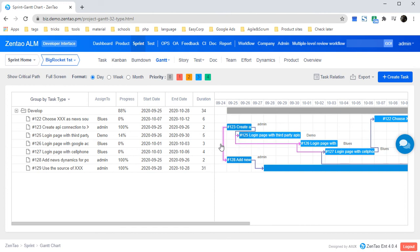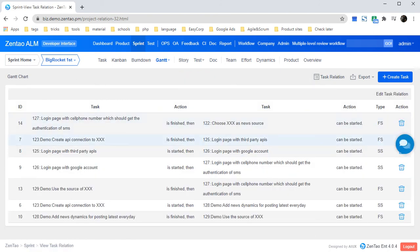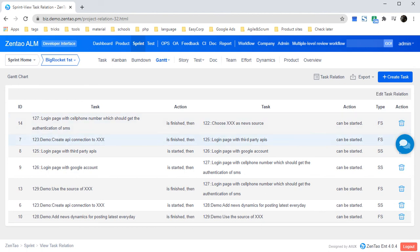The arrow lines stand for task relations, which are exactly the same as Microsoft Project. You could click task relation to edit the task relations between tasks.